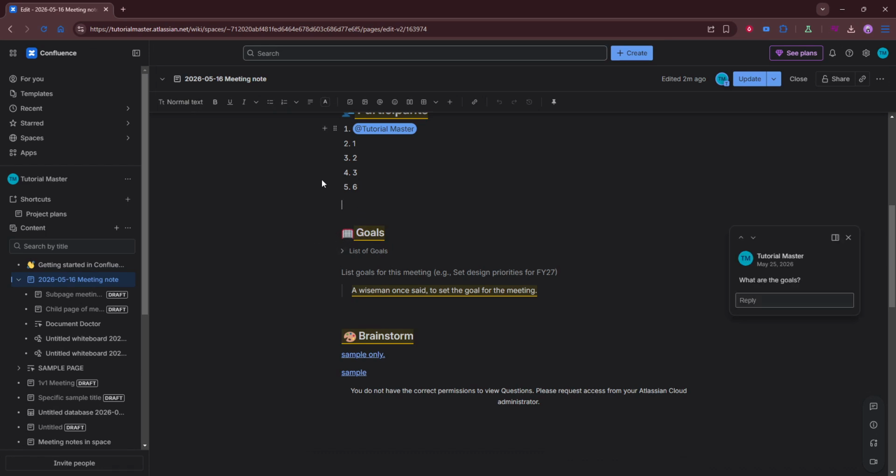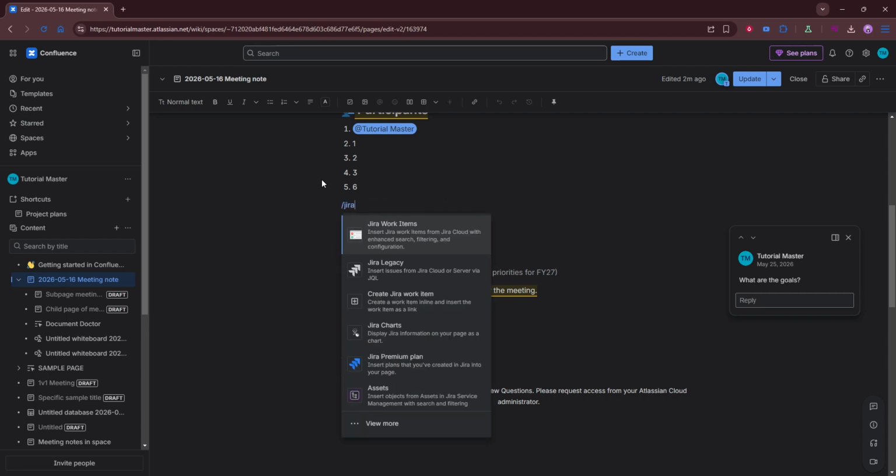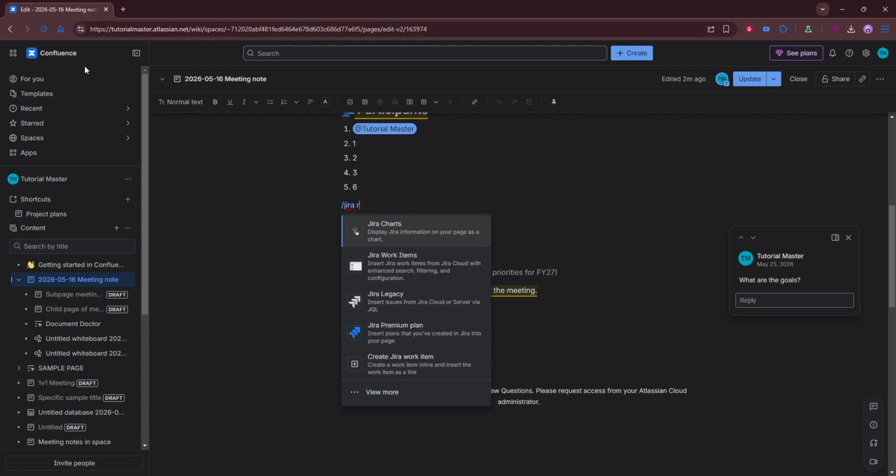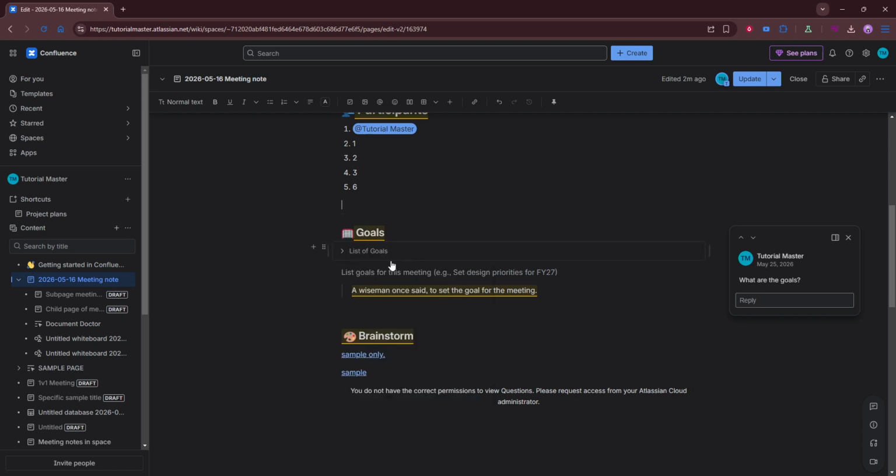Next, copy the advanced roadmap link or the specific view you want to share. In many Jira setups, you can use the share or copy link option from the plan header. If you're sharing a saved view, open that view first so the link reflects it. Keep in mind that different links can render differently, so choose the one that works best in your environment.